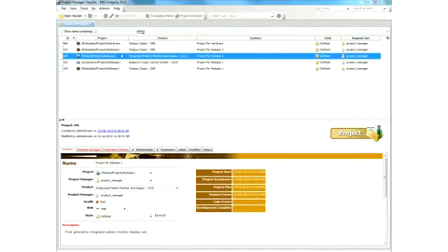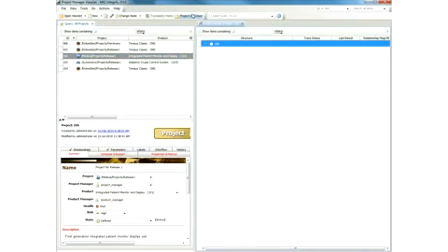For a project manager or other leaders in the organization, all of the day-to-day work of individuals rolls up into a comprehensive view of the documents and activities for the entire project. You can drill down into individual documents to examine their content and look at how that content decomposes. Here we have a failure mode that is mitigated by a requirement. That requirement is satisfied by a specification and is also validated by two test cases. We can also see that the specification itself has been validated by a test case. We also can see the last run result of the test cases and review the impact of requirements change, in this case causing a suspect trace relationship to the associated specification.